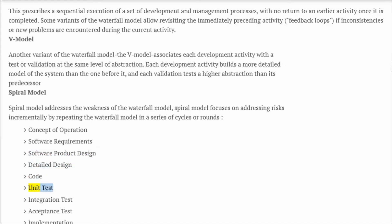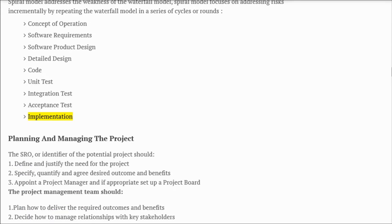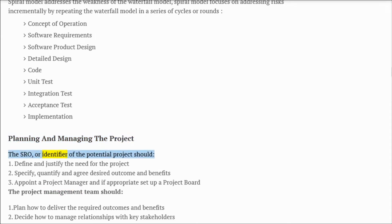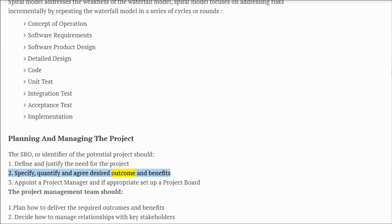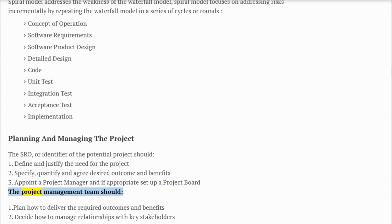Phases also include code, unit test, integration test, acceptance test, and implementation. Planning and managing the project: the SRO or identifier of the potential project should define and justify the need for the project, specify and agree desired outcomes and benefits, and appoint a project manager and if appropriate set up a project board.